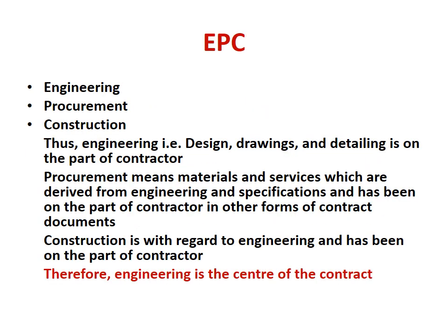And we know that EPC means engineering, procurement and construction. Procurement and construction are always carried out by the contractor in all types of contracts, whether it is an item rate contract, percentage rate contract or EPC. But it is the engineering which makes EPC different from other types of contracts. Engineering means designs, drawings and detailings. So that is generally on the part of the contractor in an EPC contract.